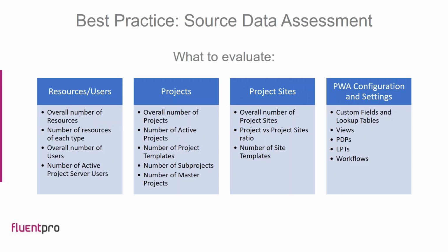Also, it would be a good practice to open like 5 to 10 project sites and visually review them and understand the level of customizations in these project sites, because Project Online in some ways has a different structure than Project Server on premises, and not all customizations can be supported in Project Online. And it is important to understand what can be migrated and what cannot.